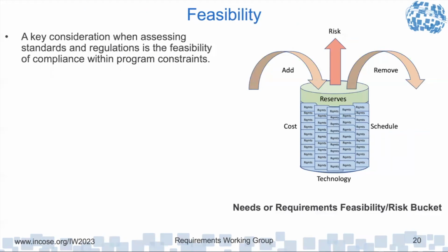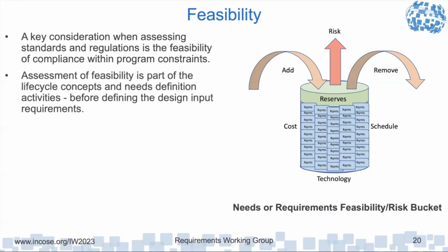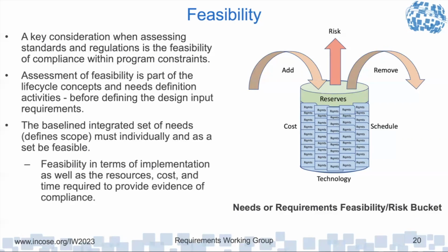We should always be doing this assessment based on cost, technology, and schedule, and also assessing the risk. We understand every requirement in response to a standard or regulation does have cost and schedule implications. So those implications we need to assess at the beginning, especially the customer needs to assess this when they're issuing contracts. And it's got to be part of the lifecycle concept needs definition activities before we define design input requirements.